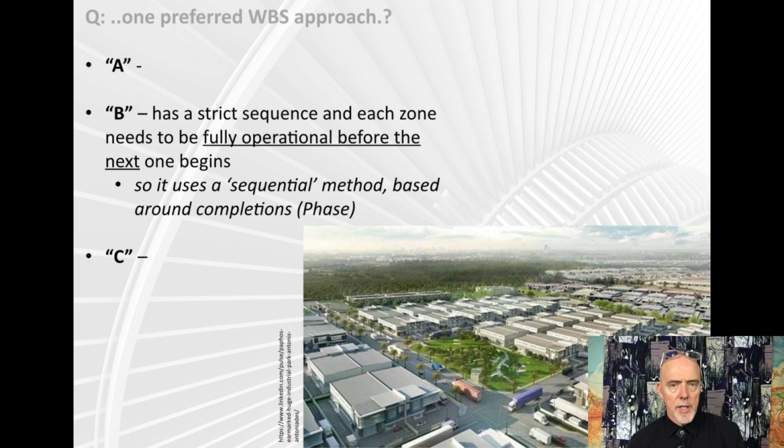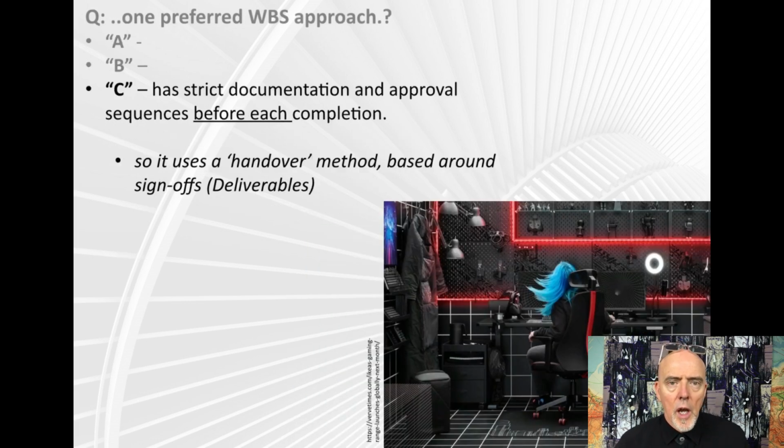Okay. Last one. What happens if things are working over the top of each other, a lot of tasks in parallel, but we have to make sure that each one is producing what it is meant to before we trigger the next one. This is generally referred to as a deliverables approach. So are we creating what we want before we start the next one? We could say, well, that's similar to a phase system because it's looking at time. Yes, it is, but as we're about to see, phase just means the activity. A deliverables one means kind of closing one out before we start.